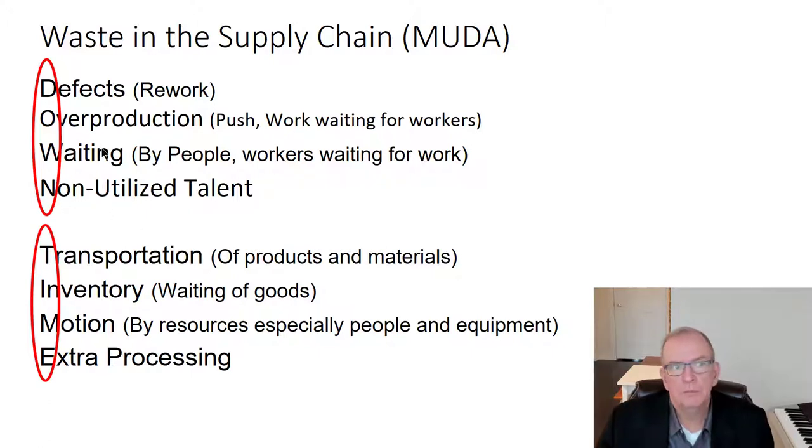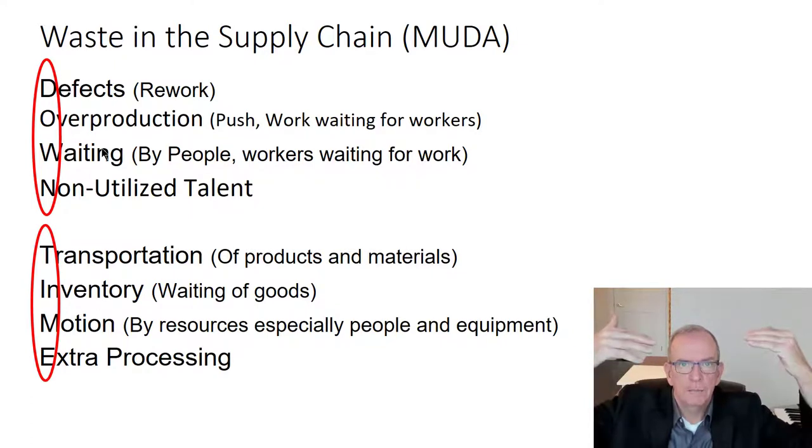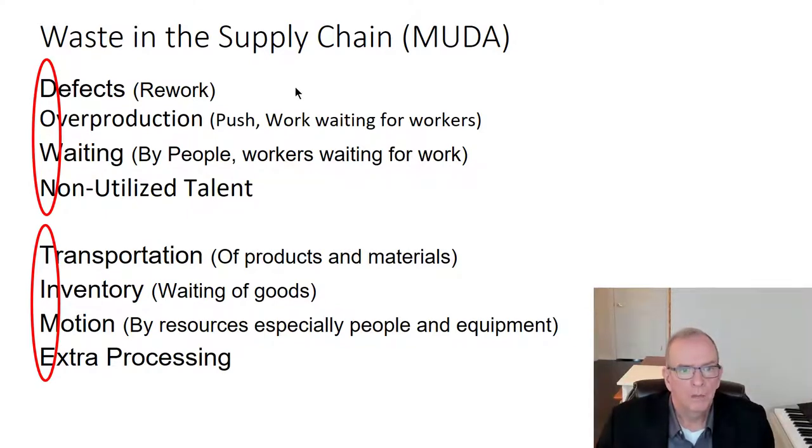A good example would be a condominium building going up, with the floors going up, the structural superstructure, and the curtain wall coming up faster than the ability to continue to do the floors. At a certain point, they're going to get stuck and have to wait for more floors to get done. So in that case, you've got workers waiting for work. So then when we've got waiting, it's the reverse.